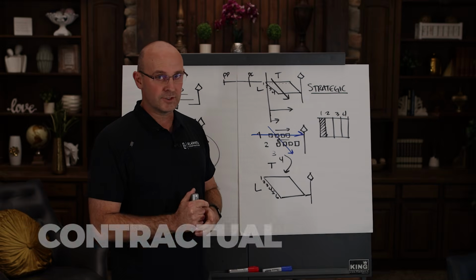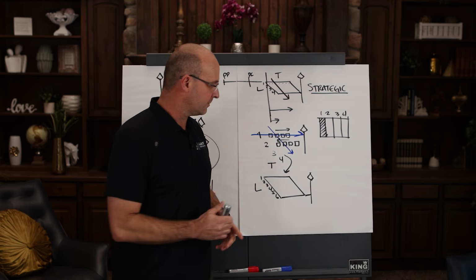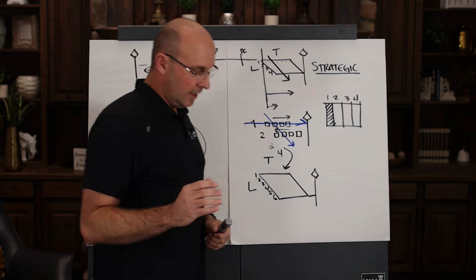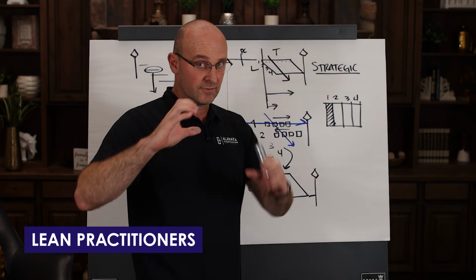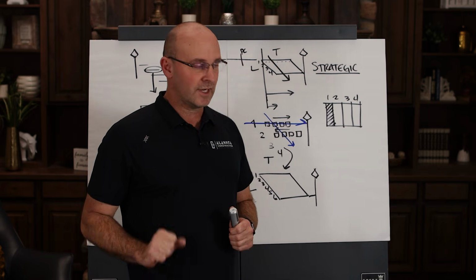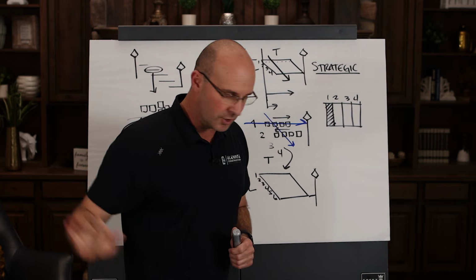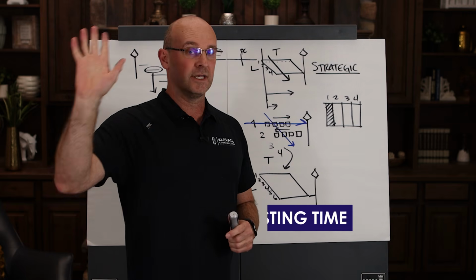So here's what I want to talk about. This becomes the base of everything that you do in the last planner system. And I want to make this clear. A lot of lean practitioners, and I love them, here's the heart, they'll say, go create a look ahead plan from scratch. Go ahead to the trades, go ahead and create a weekly work plan from scratch. No, no, no, no. That is wasting time.